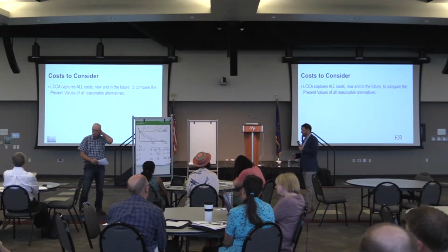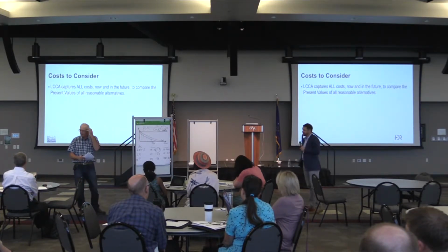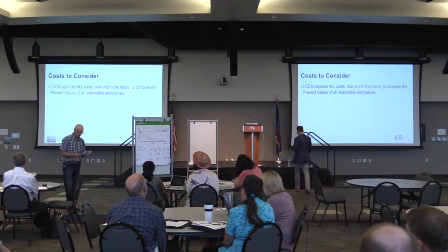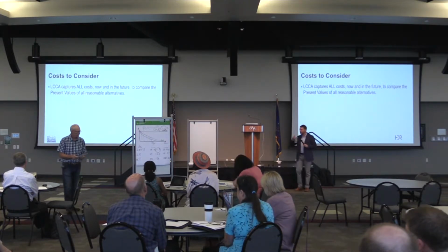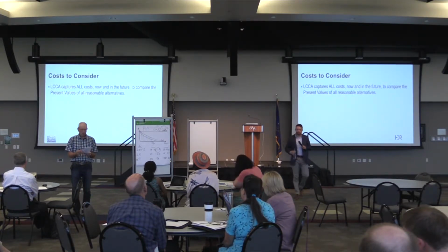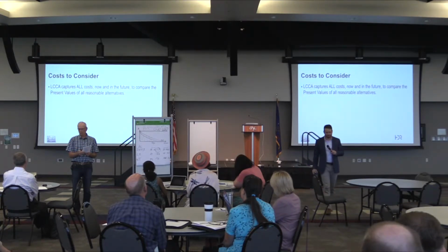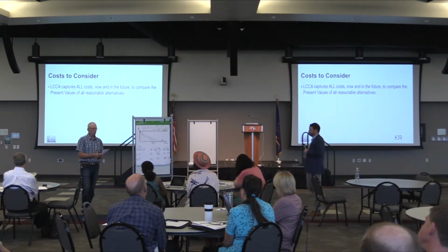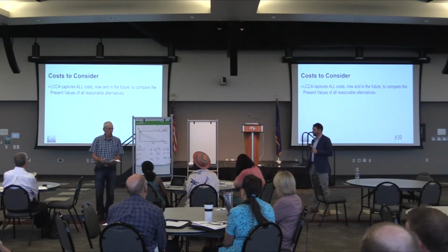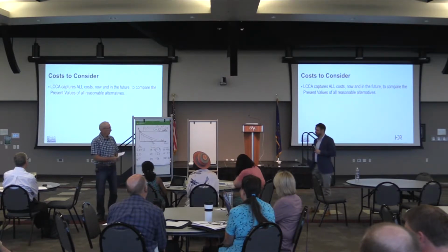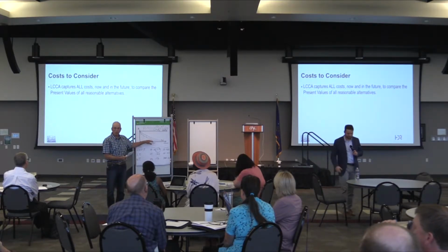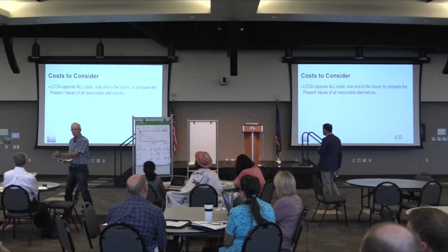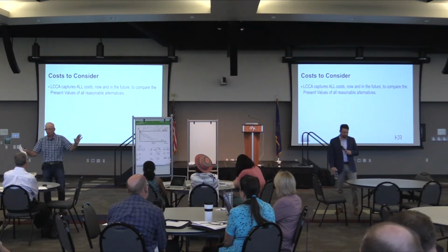Some of these sticky concepts in economics, present value is one, getting your brain around that. Elasticities is another one, which we're not going to talk about, but it sometimes takes a while for present value discussion to set in. Some of the notes that I made this morning when I got up. There's an argument that I heard not too long ago: let's build it today because it's going to cost more tomorrow. That's not true. The nominal cost may be more tomorrow, but the real cost may not be anymore. In the construction sector, if you build a bridge today or 10 years from now, using the same methods, it's going to cost the same.